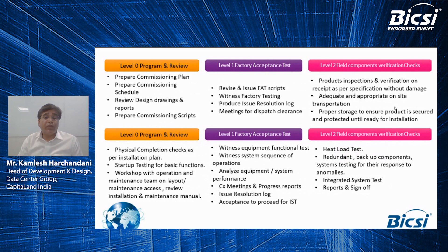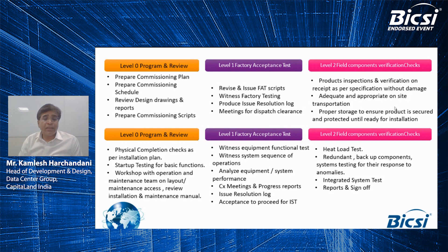I wanted to touch upon what we do at the last leg of execution — testing and commissioning. These are the steps we generally follow: at Level 0, we create a script for testing and commissioning; at Level 1, we carry out a factory acceptance test; at Level 2, we make sure that the equipment received at site is verified as per our specification requirement. What is also important is Level 3, Level 4, and Level 5, which finally talks about the commissioning of the data center with ISAT.